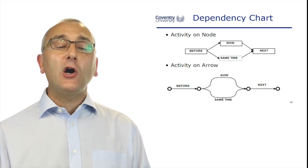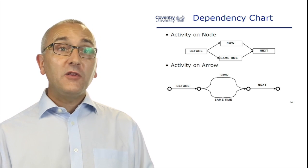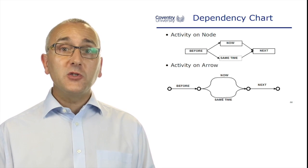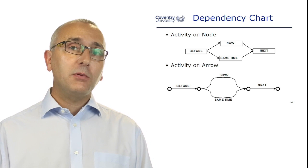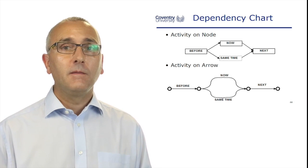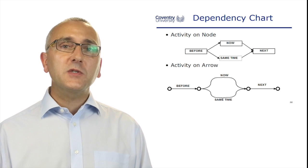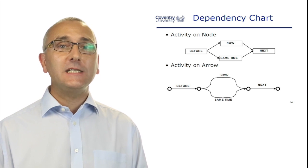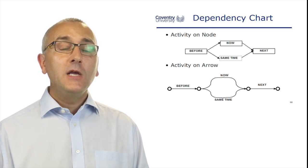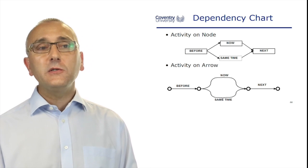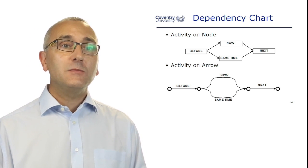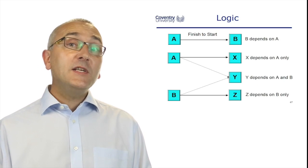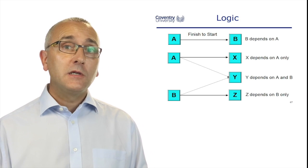There's the activity on node method, where the tasks and activities from the work breakdown structures are written on nodes or boxes. That's the top of this slide, and that's the method we'll use in this module. But sometimes in textbooks you'll see activity on arrow, where the task or activity is written on the arrow and they're connected with boxes. We're going to use activity on node (AON). Sometimes you see AOA, activity on arrow.